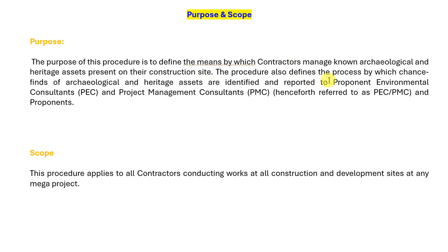The procedure also defines the process by which chance finds of archaeology and heritage assets are identified and reported to the proponent, the environmental construction consultants, and the project management consultants, referred to as PEC or PMC. Proponents are sometimes also called the client or the owner of the project.